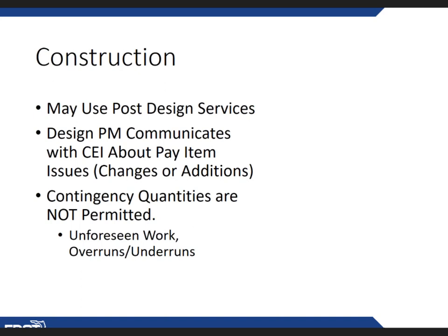If it's an unknown, there are specifications already in place for unforeseen work. They're addressed in the Division 1 specs, and that's what we need to follow if something comes up as a surprise. But if you know about it, it needs to be addressed. Contamination, that needs to be answered before we move ahead. It's not something that we put in, well, what if, or if this happens. So make sure you know what's in those Division 1 specs with all the legal requirements.